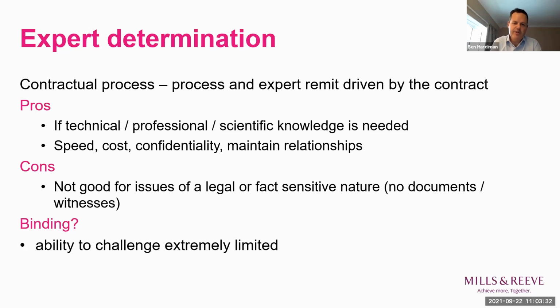In brief, expert determination is a binding dispute resolution process. It's established by the terms of the contract, which the parties enter into for the purposes of the project, and it tends to be used in disputes where there's a scientific, specialist or technical problem. Great. Well, obviously, every construction dispute will involve specialist and technical issues, so this sounds like a perfect forum. Are there any downsides to expert determination?